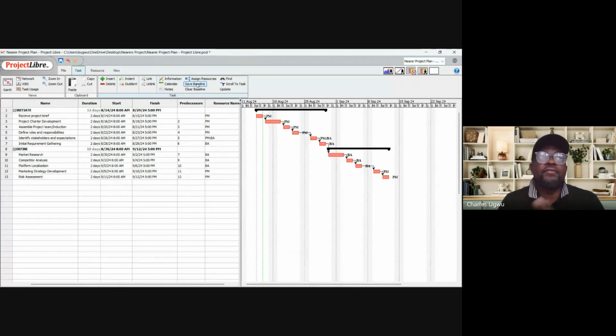A mistake is different from changing your baseline. So if there is a mistake, you can clear the baseline, correct your mistake, and rebaseline it. So this is where you capture the baseline. Once you do this, you see entire project. You have captured the entire project. You click OK. You save this entire project. It's baselined.